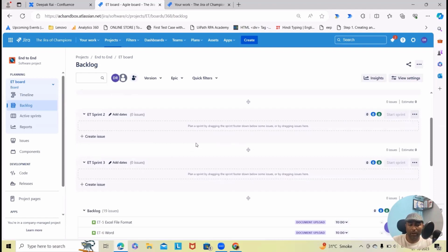Normally, whenever we are moving items or the backlog items into the sprints, we have to first understand the velocity of the team or the team's capacity. So the team's capacity will be calculated earlier, and based on the team's capacity, we can add it. All this information you will get in my course. Here, I just wanted to cover, within our end-to-end process, how we can generate the boards. So this time we are on step 2, where we are creating line items and then managing them, which is the third. Now we have started with managing our backlog items.